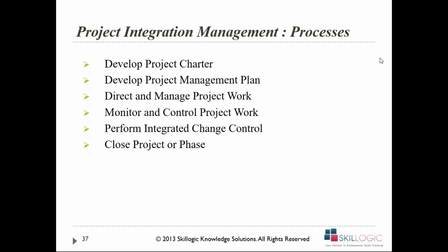Then we have develop project management plan. The project management plan is about what we are going to do and how we are going to do it, right? What and how we are going to do the entire work. The project management plan is never complete till all its subsidiary management plans are complete. What are the subsidiary management plans? Scope management plan, cost management plan, schedule management plan, HR management, communication management, stakeholder management, risk management, procurement management, and so on.